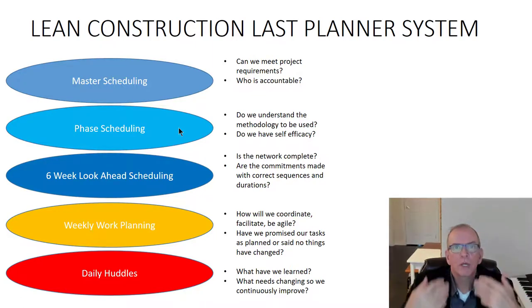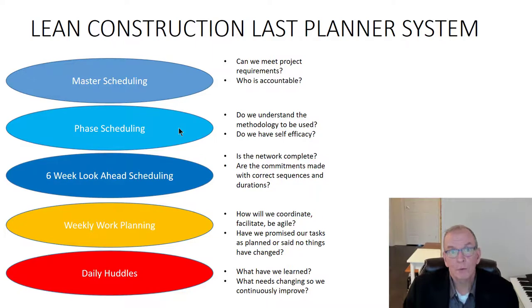All right, we're going to do what we call pull planning, which is the aspect of making sure that you don't have work waiting for workers. You're pulling the work towards the customers. But we're engaging the people that are going to be involved in this process. That's different than traditional methods.